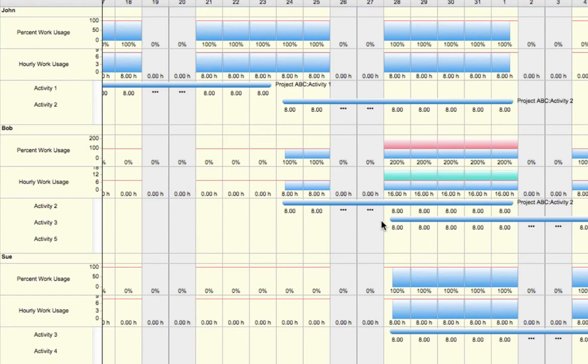For example, let's say that on Activity 3, Bob is actually not going to be working the first five days. What this will mean is that we can place zero hours across each of the days from Monday to Friday on Activity 3.